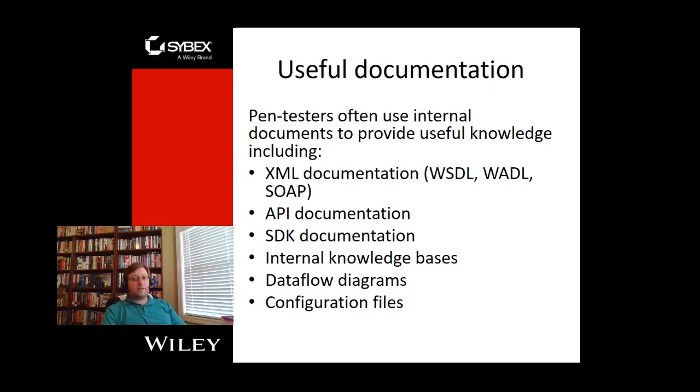If you are testing a designated number of things and you don't clearly define that during scoping, it could be problematic later on when people say, well, I was expecting you to test these things as well. Scope creep is something that can be problematic for a whole bunch of different projects, and pen testing is definitely one of those, so be careful about that.